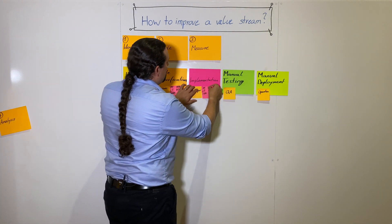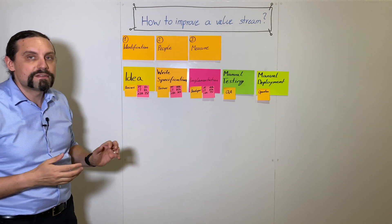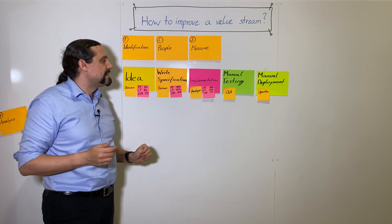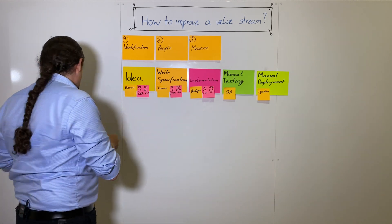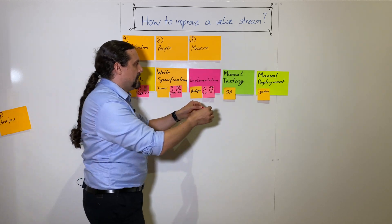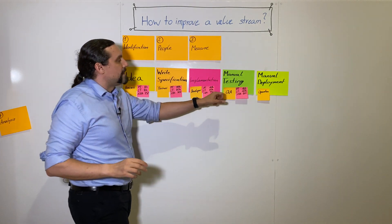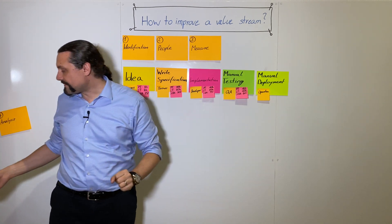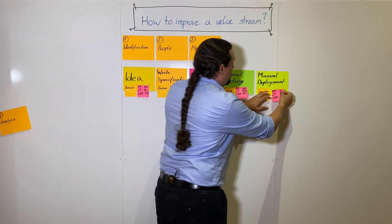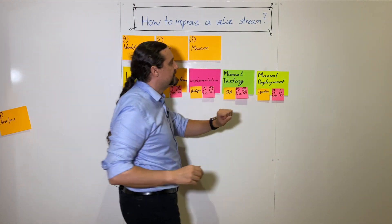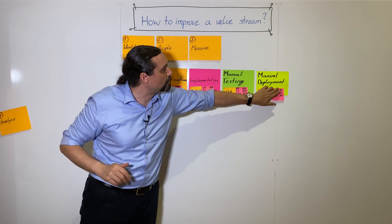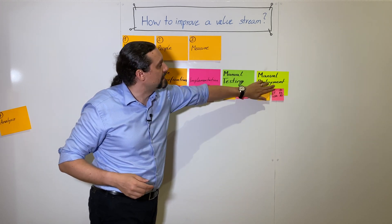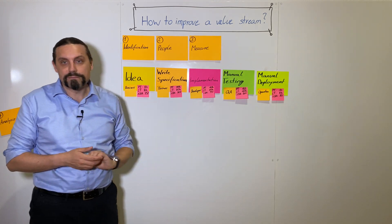In the implementation we have measured a process time of 40 hours, lead time of 80 hours, and percentage complete and accuracy of 75 percent. In manual testing we have a process time of 16 hours, lead time of 40 hours, and percentage accuracy of 50 percent. And last but not least, manual deployment: process time of one hour, lead time of eight hours, and percentage accuracy of 80 percent.